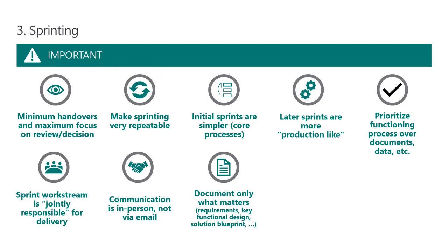The idea behind the sprinting is that you are literally sprinting. Yeah? You're not stop-starting. You're not crawling and then restarting. So the idea is that the solution architects and the PMO are helping you by looking ahead at the next sprint and saying, I can foresee there are 3 business decisions I need to get from the business in order to make sure I know which design direction I need to take. Or I've got 3 things I know I need to take to the technical design board to get approval on, because this design needs to get approval through them.